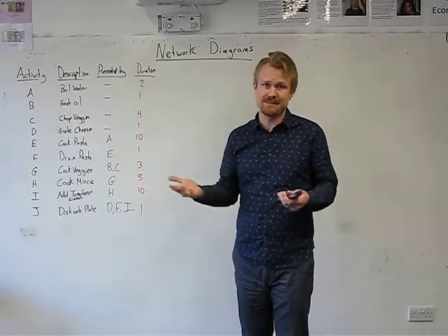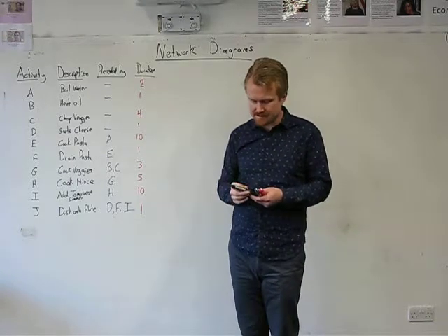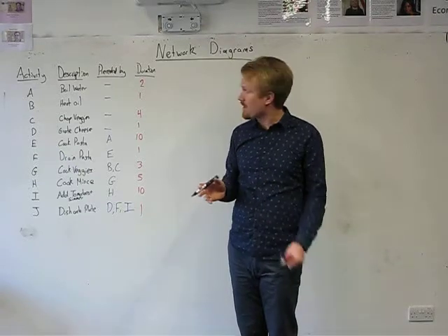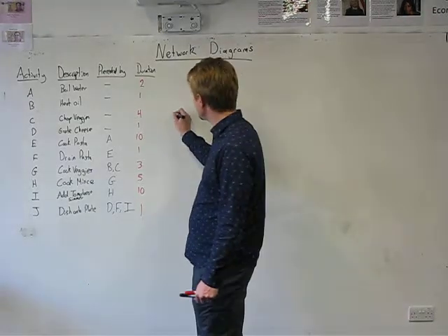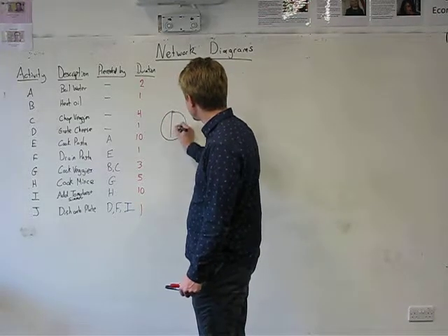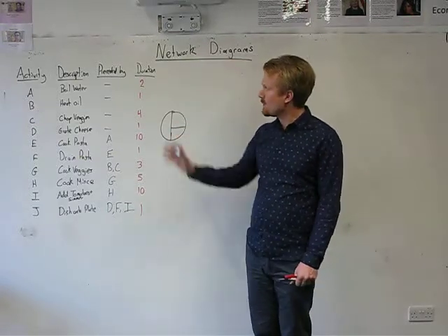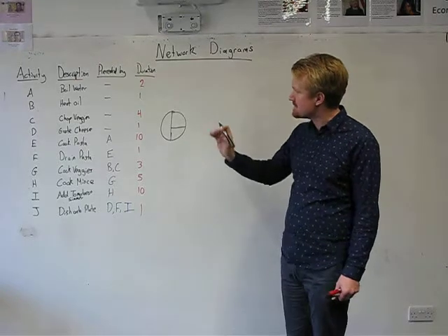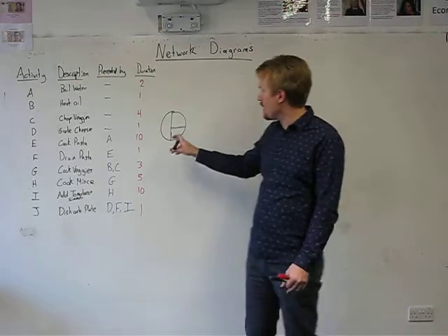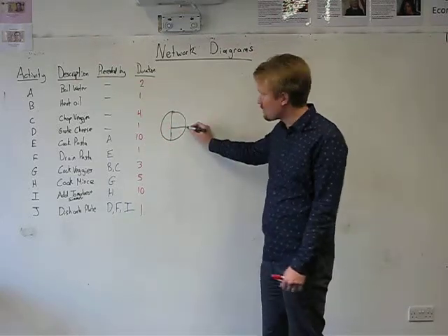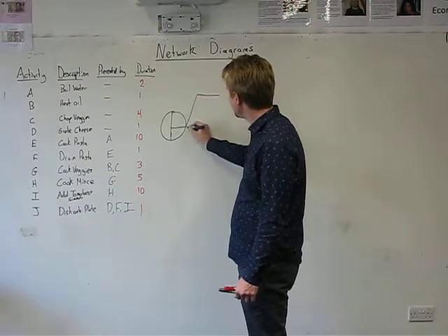And in this case, because it's making a meal, we'll say that it takes minutes to do these different tasks. So to draw this diagram, what you start with is a point in time, which is a node. So you draw a circle, and you say, here's our starting point. What can we do to begin? All right? We look at the table, and we say A, B, C, and D. We can just crack on, start doing them. So from this node, working from left to right, from the right side of the node, we can start to draw some tasks. A, B,